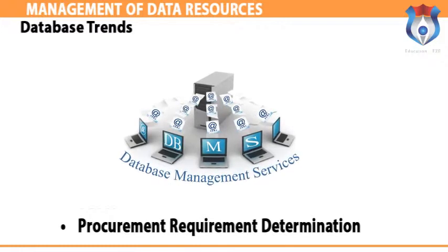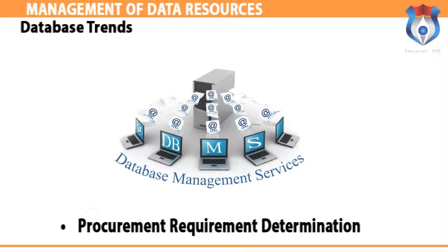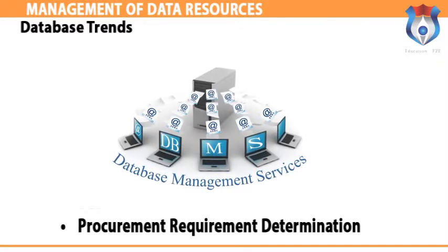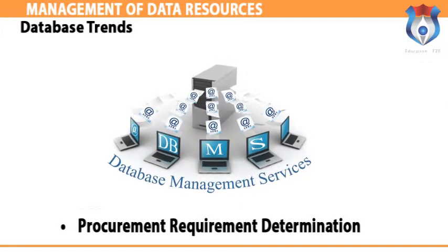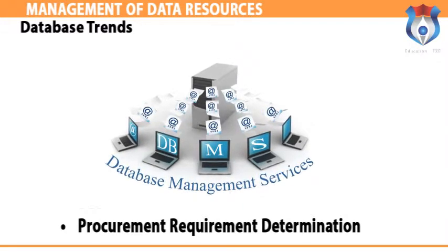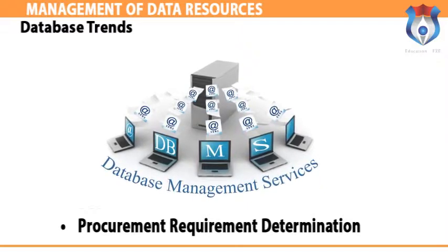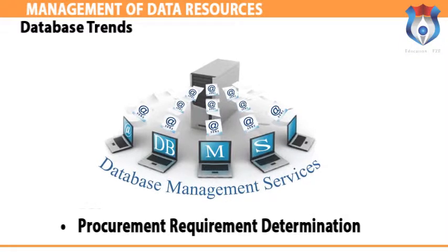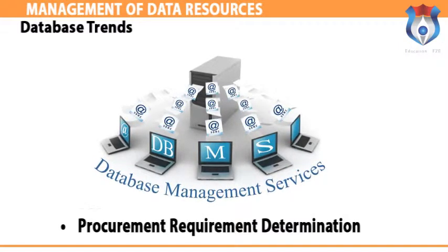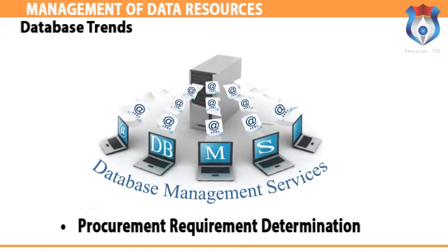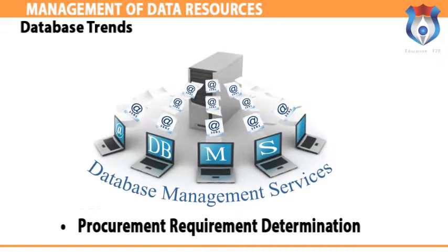At the end of the requirement definition stage, a clear determination of the terms of reference, technical specification or statement of work, depending on the procurement category, should be possible, including an estimate of the budget and, most importantly, the procurement lead time. This requirement definition analysis is essential not only for new procurement requirements and project initiation and concept development, but also for requirements needed for maintaining existing operations.